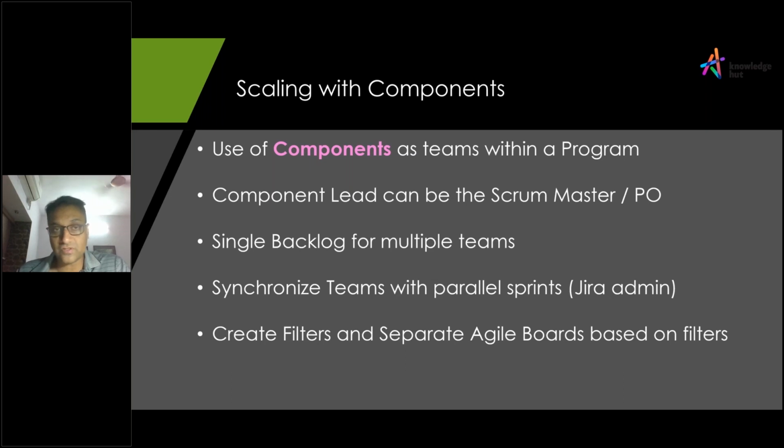If you use query results as your swim lanes, it's as good as tracking multiple teams' work on the same board. Of course, there are limitations because it's still a single project, so it's going to be a single backlog for all these multiple teams. All right, so just be aware of that.